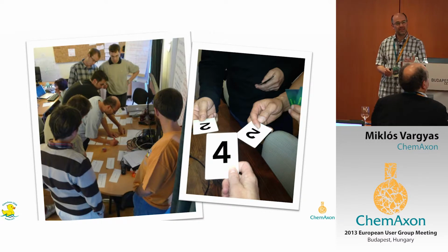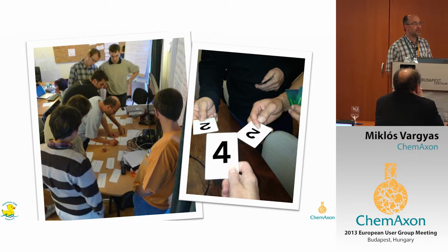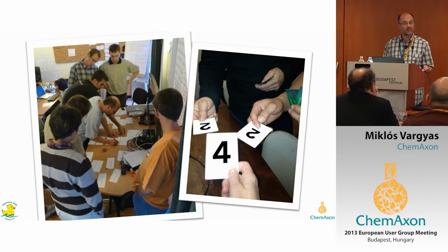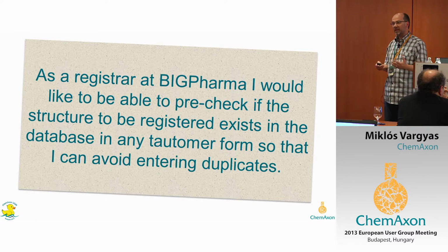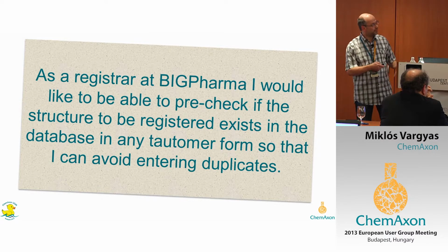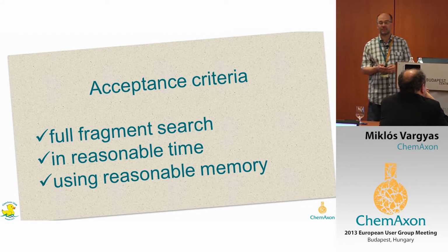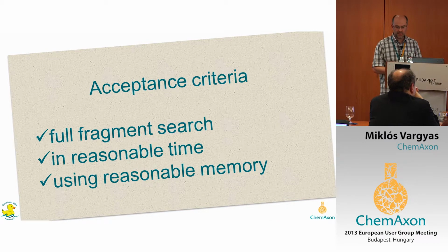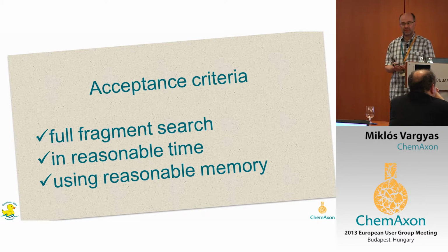Now, with this size estimate, the PO can roughly tell when this new feature will be done by the team, when he can release it and deliver it to his customers. However, some discussion happens in the planning meeting, and we better understand the story, we can better formulate it, we may even add some acceptance criteria to it that enables us to say when we are done with the story. So even after some discussion, the story is still fairly vague and quite uncertain.